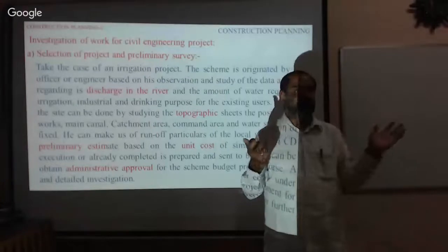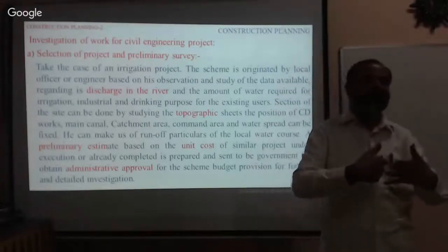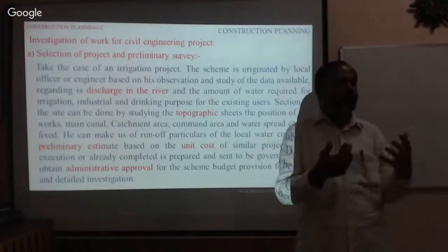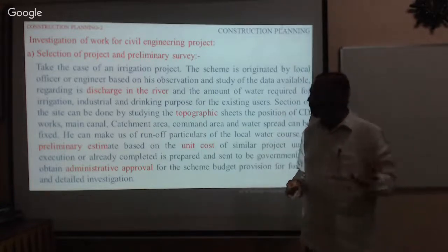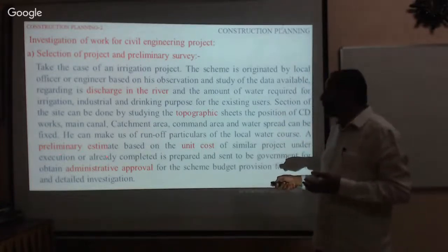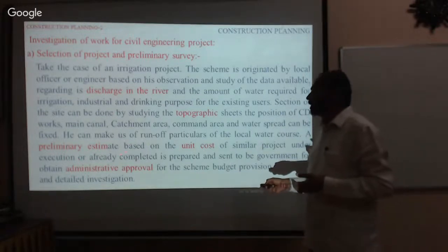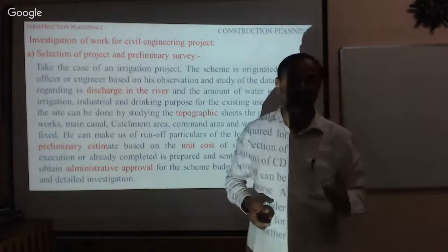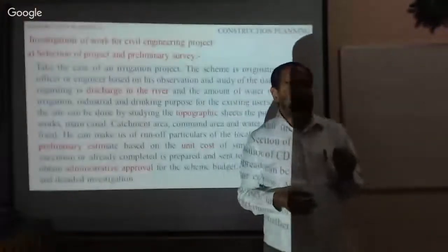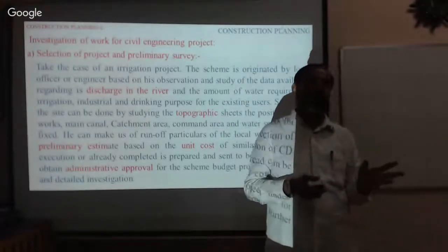Then collect the data and information, then prepare the preliminary reports. Then check the feasibility. Then prepare the preliminary estimate. It is called preliminary estimate. How do you prepare the preliminary estimate? It is a difficult task to prepare the preliminary estimate.